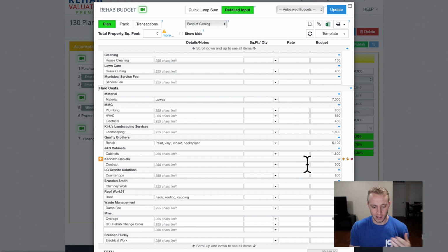But you guess high. I know I keep saying it. I'm going to beat it to death because, guys, I can't say enough. We've done this to ourselves before. You guess that this is going to be $5,000, then you can't find a contractor that will do it for $5,000. And then all of a sudden, you're at $8,000 for the lowest contractor, and you're $3,000 over budget already. Whereas if you would have just plugged in $8,000 and guessed high, you'd have been fine. Roof work and all that.